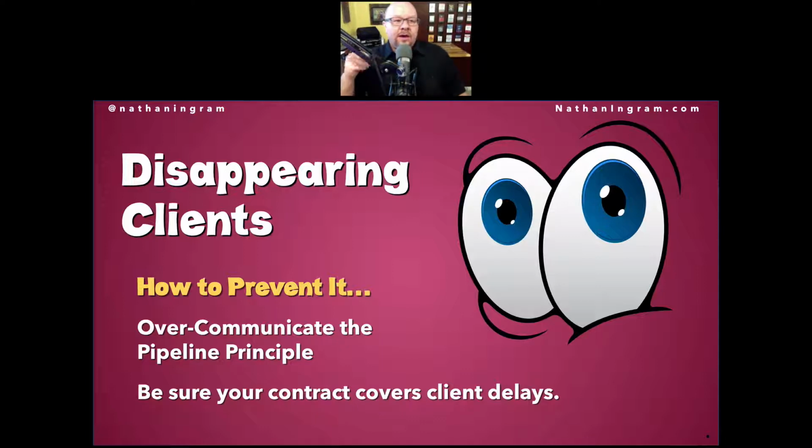So what I do as far as the disappearing client goes is I over-communicate to this kind of client what I call the pipeline principle. This is in my contract, and it's some of the things that I talk about in those Friday 3-sentence emails that go out. If your project is delayed, whenever you come back to us with what we need to get started again, you're going to be at the back of the line because we have active projects we're working on. We can't just sit on our hands and wait for you to get back with us.